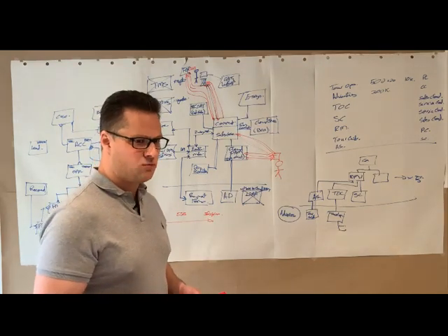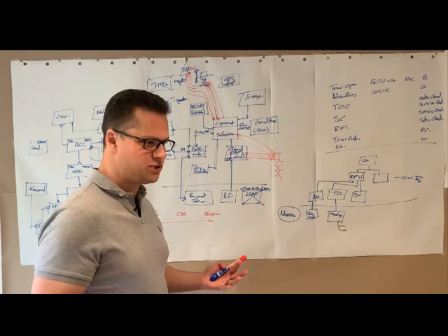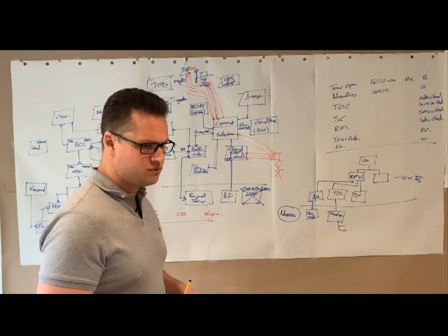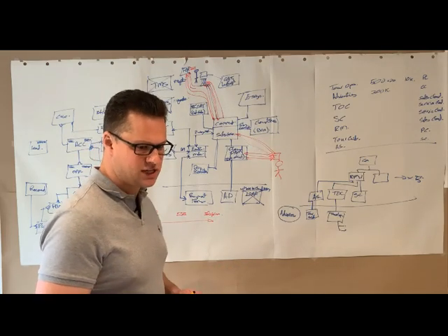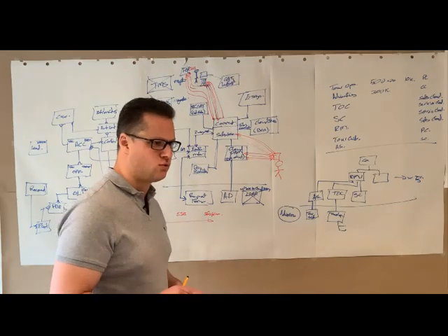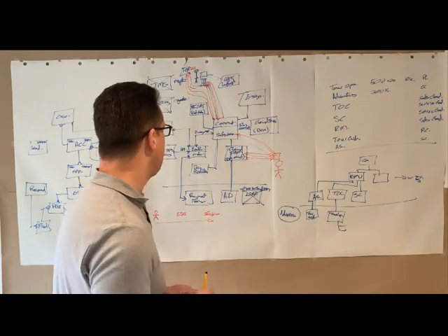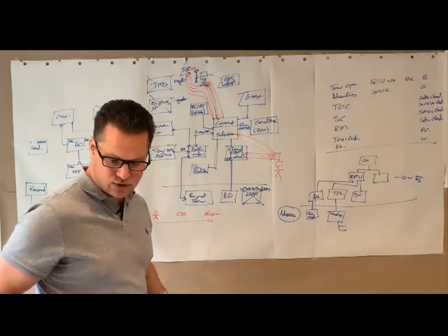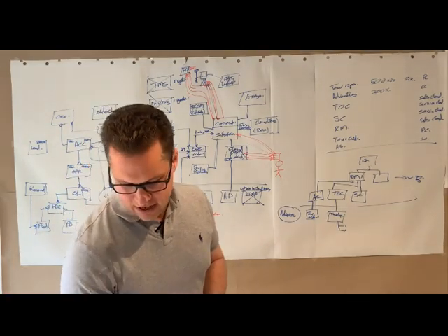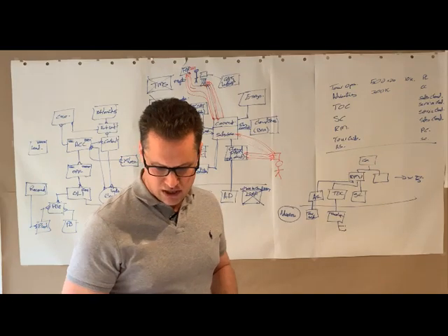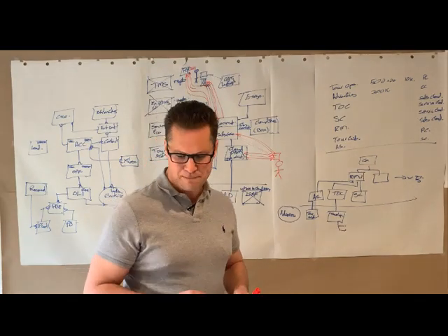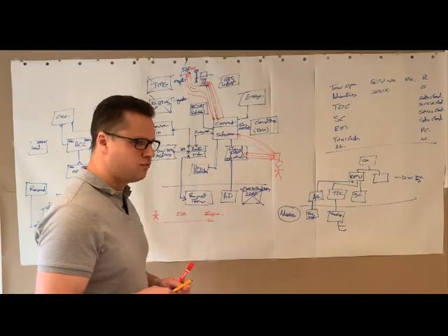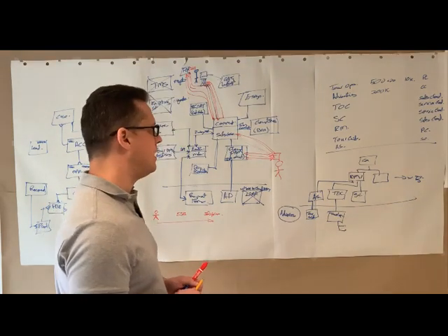It would also mean the project would have the opportunity to define those standard business processes, because a couple of times it does call out the need to standardize. So I think we would start with that and get some early success. It would also allow us to test out the ways of working between the different silos within the organization. And then we would look to ramp up